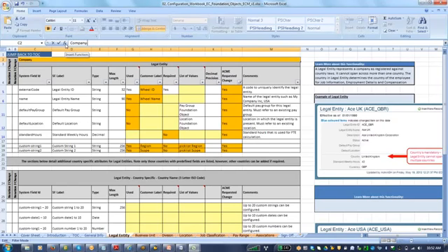You have to match the legacy data with the Employee Central UDF file. Once you do the matching, the data loading will be very easy. That is another Herculean task of getting the data, downloading it, and then getting it into EC, and again there are a lot of steps for that. You need to follow particular steps for the upload, and there are some six steps you need to follow.